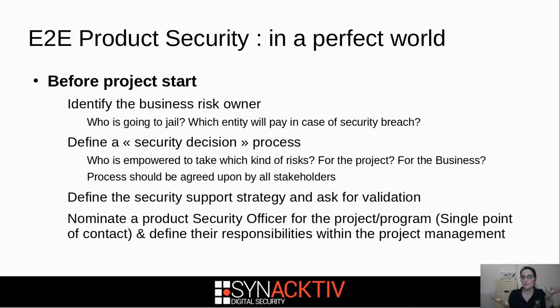Then you should nominate a product security officer for the project or the program. It should be a single point of contact. Okay? You do not want to have five or six security engineers all speaking at the same time. If you do that, what the project or the business is going to do is ask all the engineers and choose the solutions that they like the most.